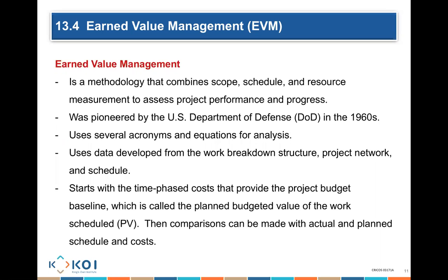We know for each period how much we're planning to spend to do work. So this is really what I'm talking about in terms of the time-phased cost. We have phases of how much money we are going to be spending at any particular point of time. The time-phased cost provides the project budget baseline.